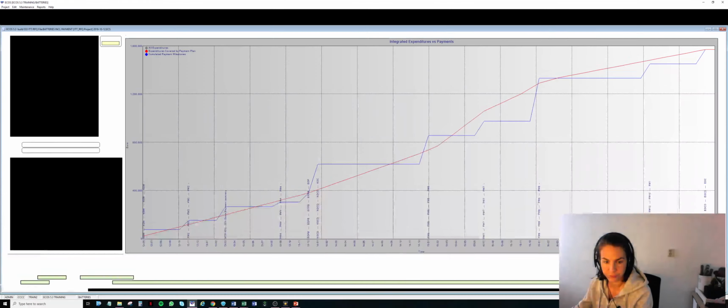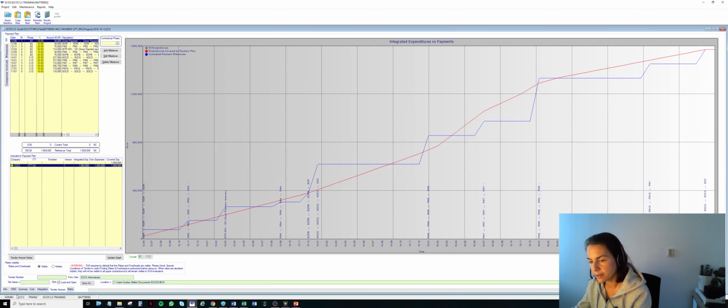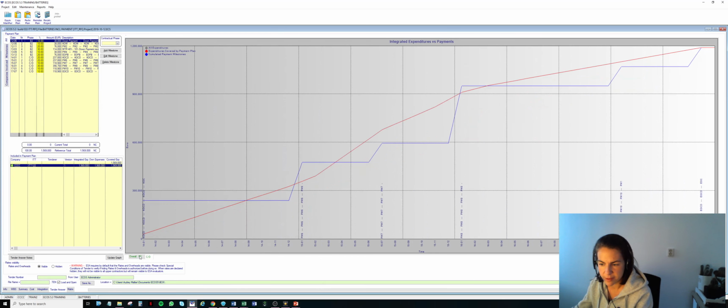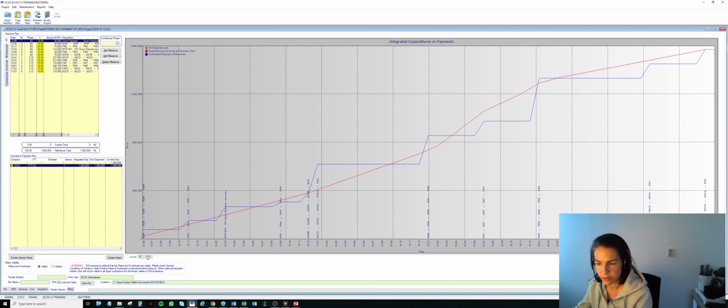So you see here, down below, you have a payment plan for each of your phases. It turned green, which means that you are covered. You can choose the visibility here of your rates. You can have them visible or hidden. By default, we are asking you to show visible rates because this is important, of course, for the evaluation. But there was some possibility in the past to have hidden rates for companies with specific needs, but here in the context of the evaluations, this is not the case, so please keep the rates visible.